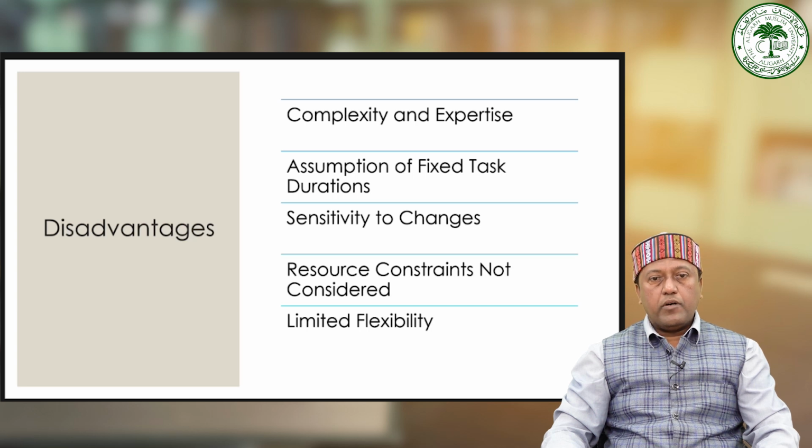Third is sensitivity to changes. So CPM schedules are sensitive to changes in the task durations or dependencies. Any alterations to the project plan may necessitate a reassessment of the entire schedule, leading to potential delays and disruptions.